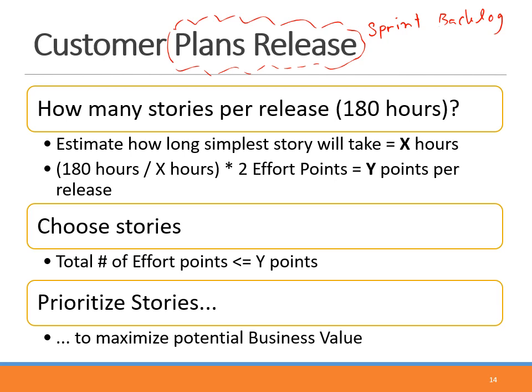We also need to estimate the whole team capacity as well. That is how many stories, how much of the effort the whole team can do within a sprint. It can be by means of numbers: how many people you have, how many hours we have within each sprint. You can multiply and calculate, right? Then you can use this to select the stories to fit your capacity.